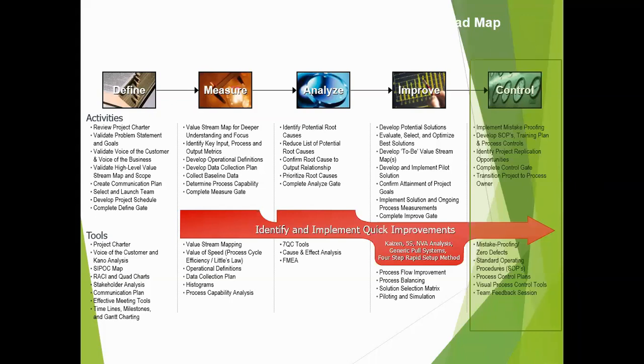the issue, the description of the issue, the date. You put dates in there from what period to what period, how it's going to be impacted, whether it's operational or with a monetary value, and it puts a person responsible. Right. And then there is a stakeholder analysis. Stakeholder analysis is nothing but identifying who's going to be your sponsor in the project, who are the key people who should be taking the decisions to help you with the project, and what are the things that will keep them happy, right? And who does what? Management is very important, right?